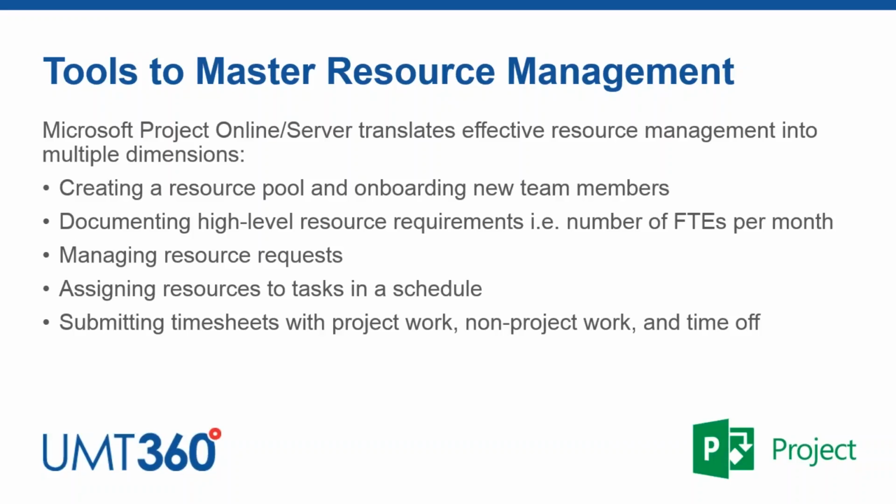And with that, with the current version or with Project Online, we now also have the ability to request resources. That's actually a new function that was introduced earlier this year, did not exist in previous versions, and it allows project managers to collaborate with resource managers online to document a resource contract, an agreement that says, okay, I can use this particular person on this project for a certain amount of time.